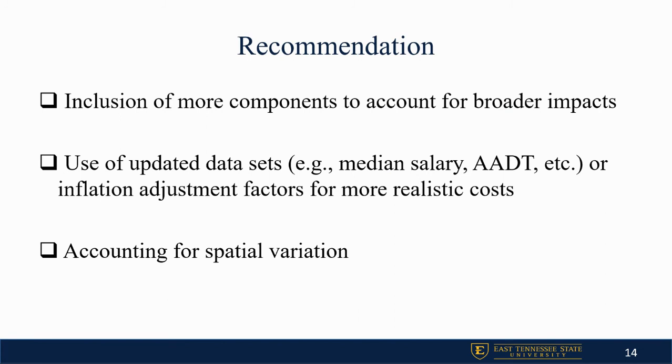So to the recommendations. As stated earlier, based on the findings, we recommend improvements to be considered in the future methodology, which is to be developed by the research team or Department of Transportation. First, we recommend the inclusion of more components like the crash cost, emission cost, and the business impact cost in the methodology, as most state departments of transportation currently don't include a lot of components.